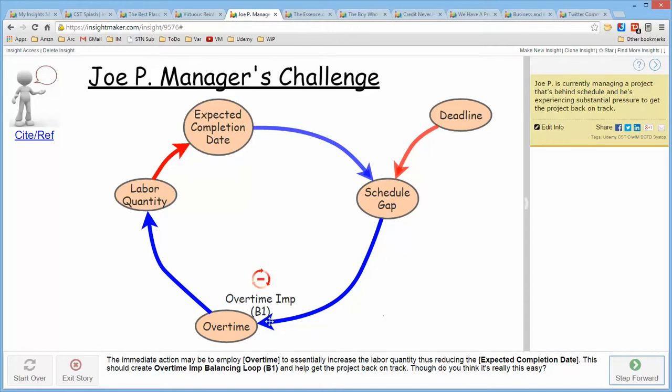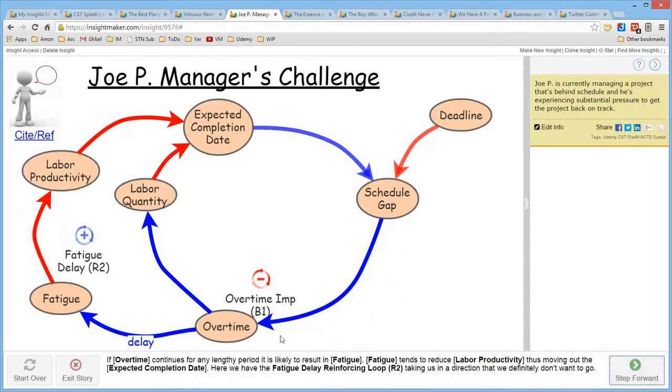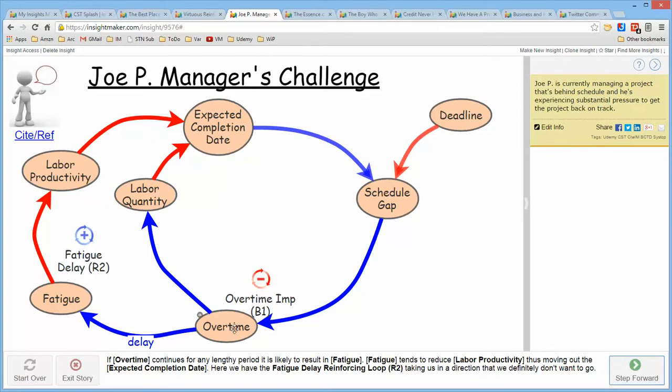And then I ask myself, what does overtime influence? And I find out that overtime, prolonged overtime, actually leads to fatigue and fatigue reduces the labor productivity. Labor productivity should improve the expected completion date. But since labor productivity is going down, the completion date is getting later. So this particular loop, when I walk it, has two opposite influences in it, so it's a reinforcing loop.